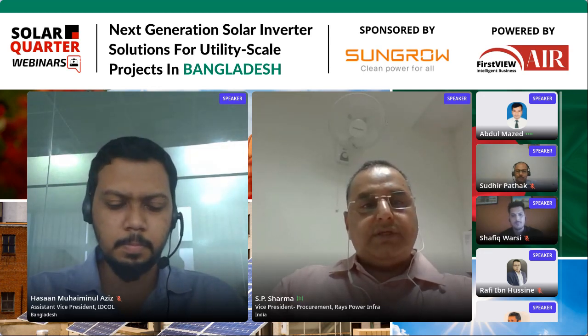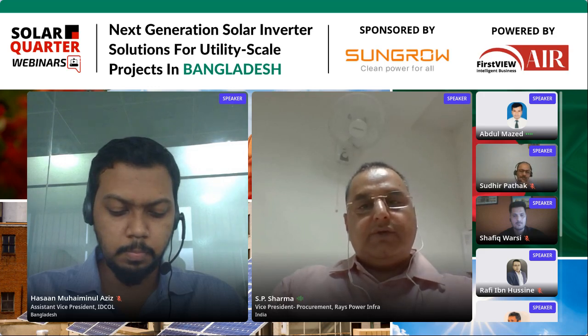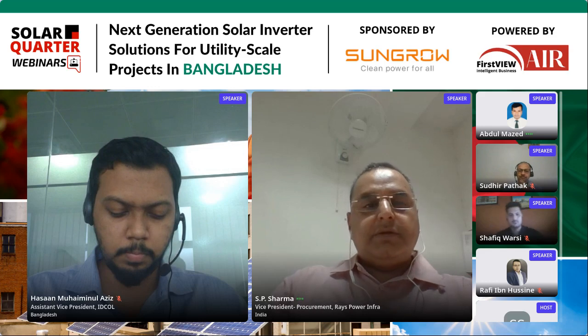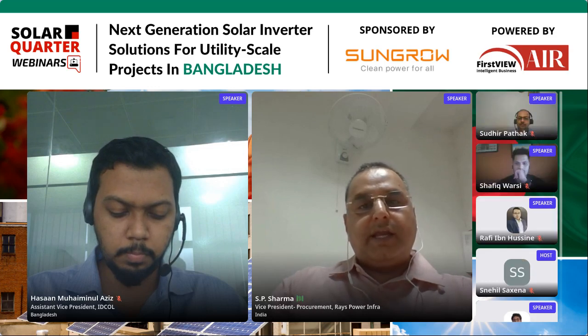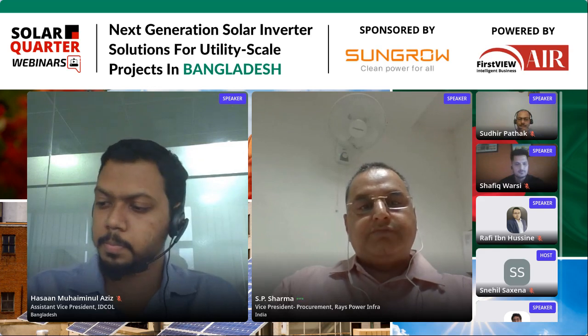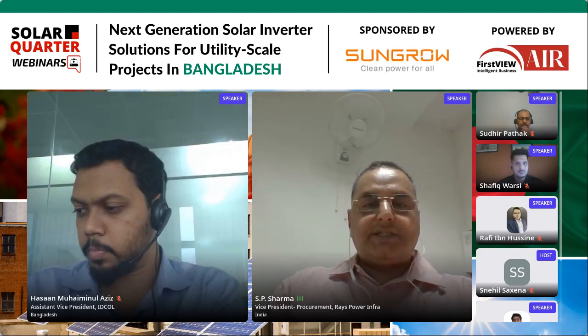So if we go with Sungrow or any other inverter, we have to take a minimum 5 years warranty. And when you finalize the inverter, you can opt for extended warranty options also. You can take a commitment in writing from the vendor about the extended warranty, from 6 to 25 years. Whatever the cost is, you can negotiate and finalize the extended warranty.